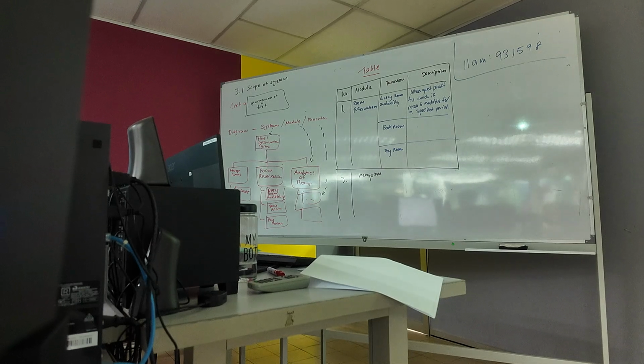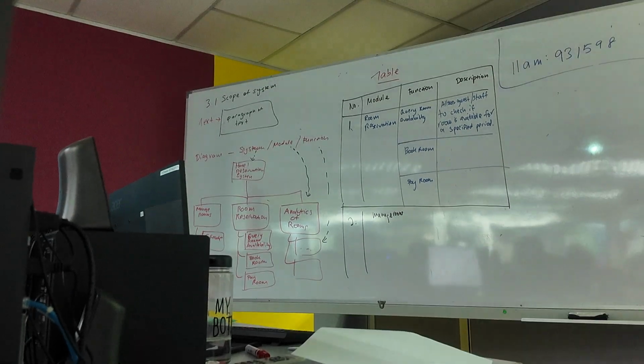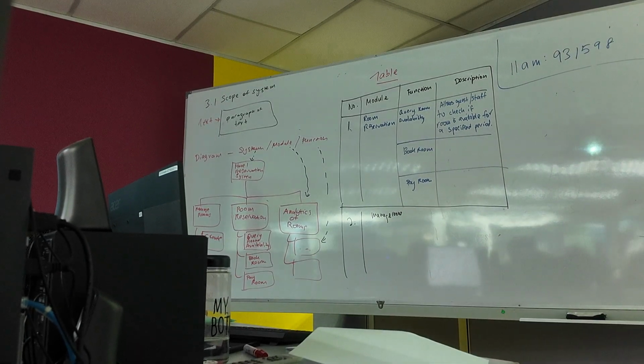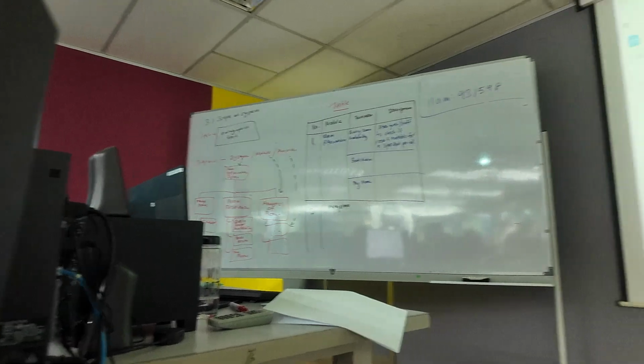Let me give you an example. You're building this hotel reservation system and it's web-based. So your exclusion could be: there will be no mobile iOS or Android application, no unique app for iOS or Android for this system. So that's one exclusion. You need to give it a header, and then describe a little bit what you mean by that. Okay? That's one example of an exclusion.